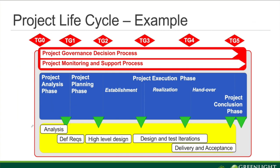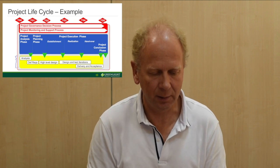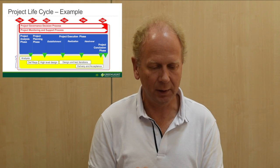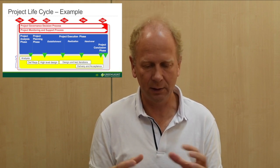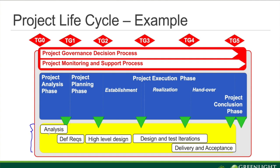This is an example of a project work model. It could be anything, but this is just to give you an idea. Here you can see five different parts — this could be part of a WBS work breakdown structure. In this case we will have an analysis, a definition of requirements, high-level design, design and test iterations several times, and maybe finally delivery and acceptance. This is one typical product — could be a software development project, hardware development, or a customer delivery.